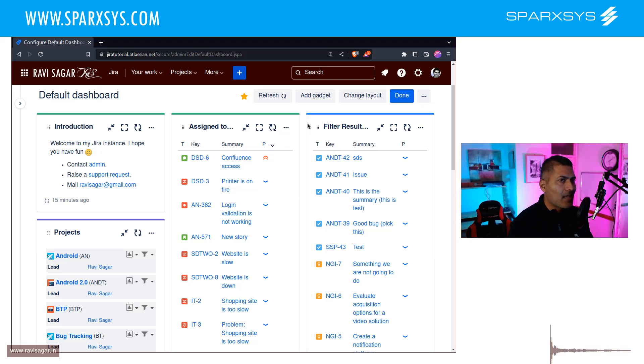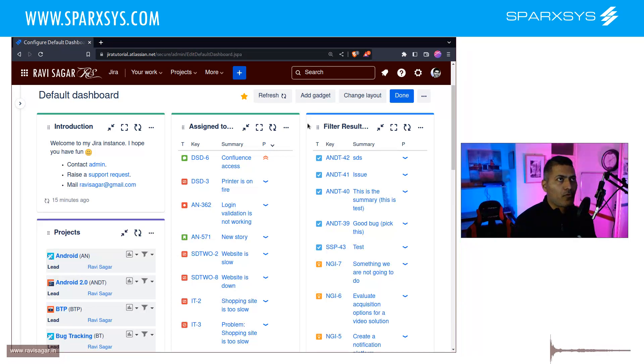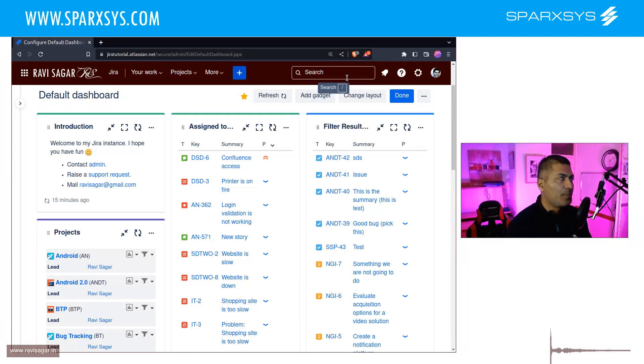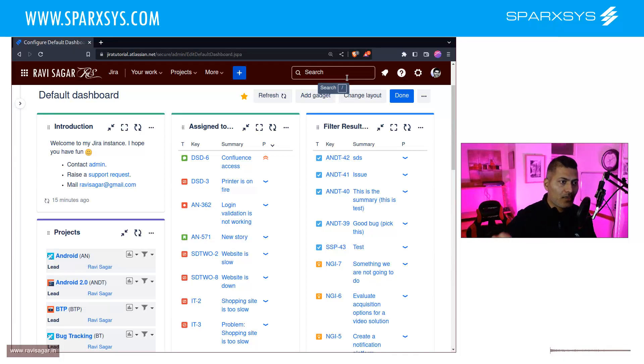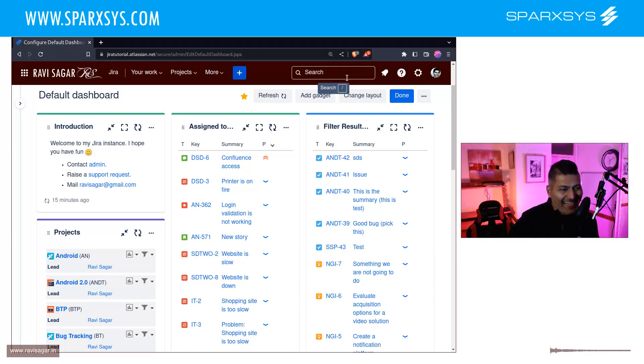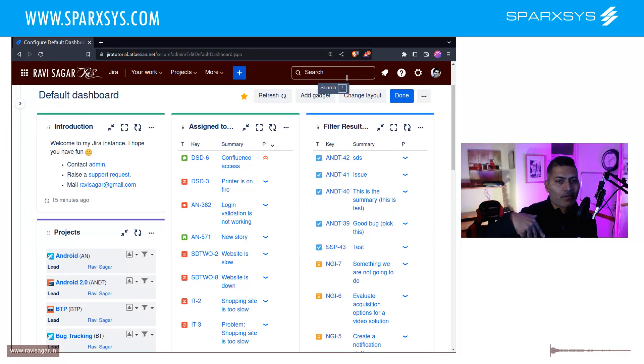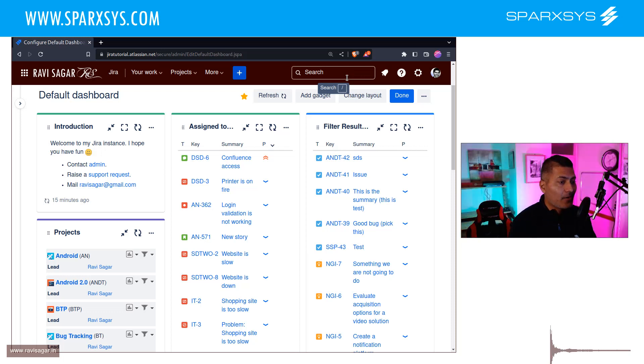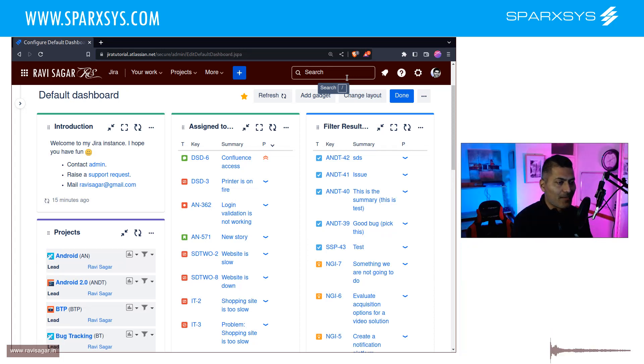The JQL could be as simple as reporter is equal to current user. And it is always a good idea to also sort it. So your JQL could be reporter is equal to current user, and then parentheses and then order by created, and then DSC, which is basically descending order. And then of course, all the issues that you create, or those users will create, the list will appear on the dashboard for them to refer to.